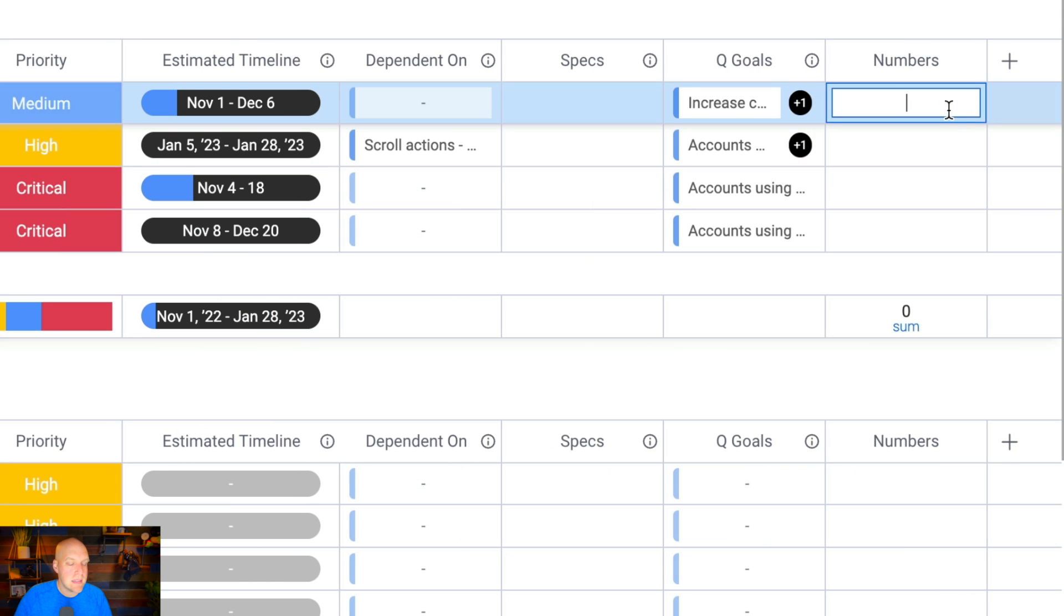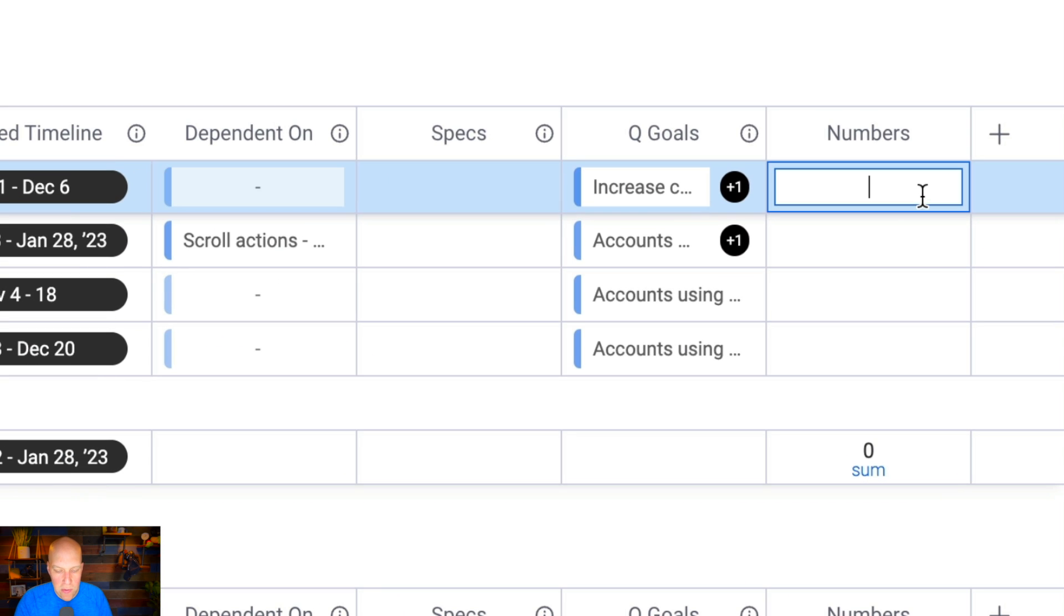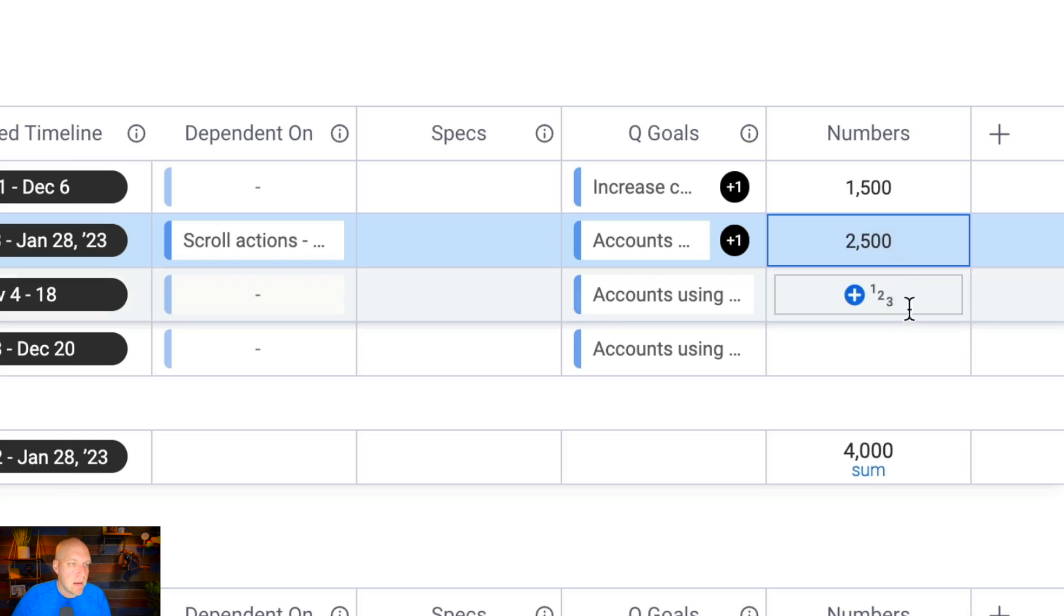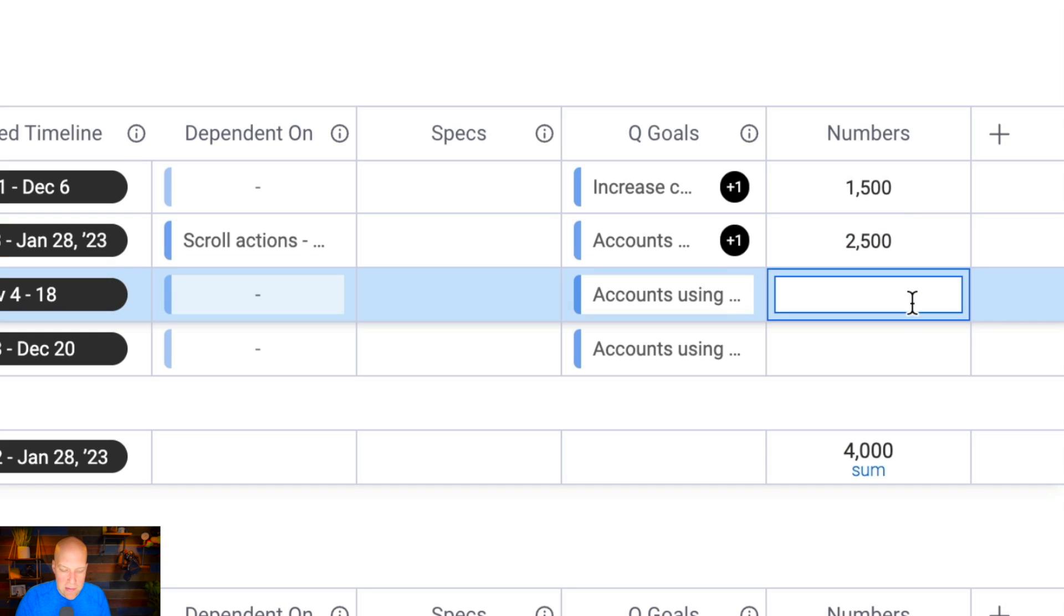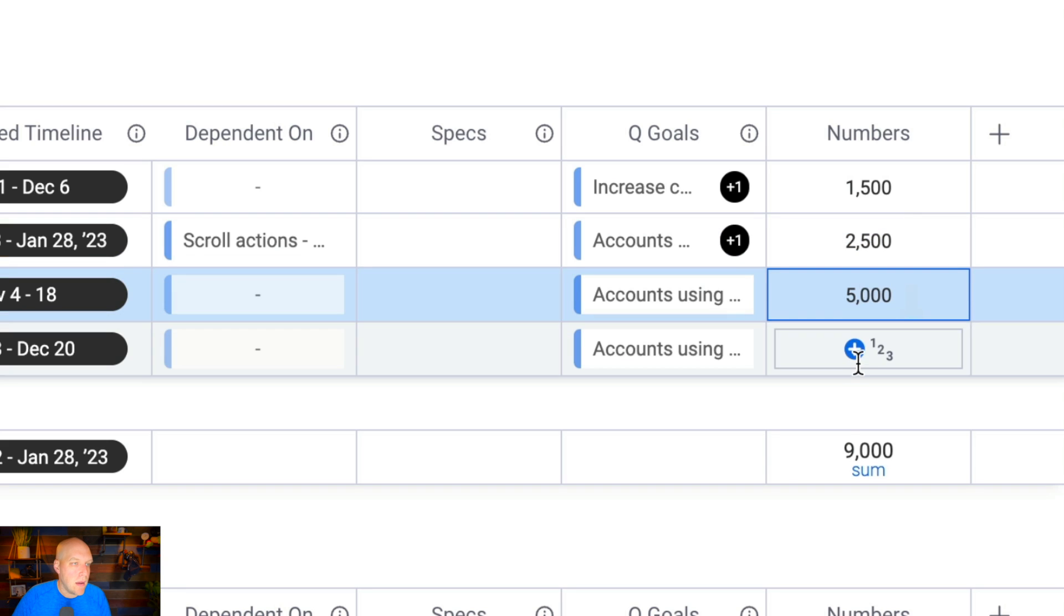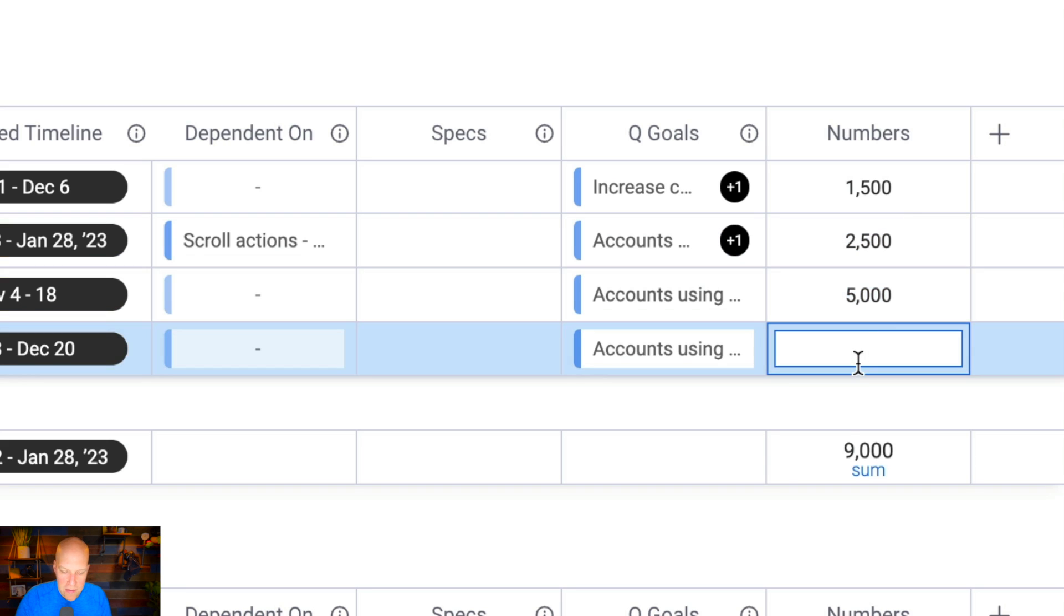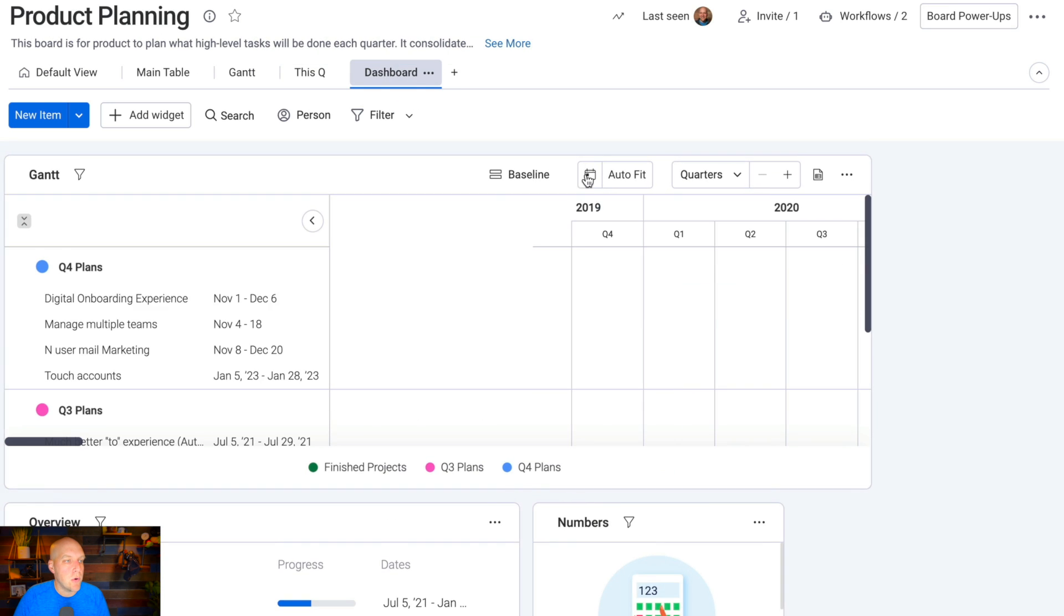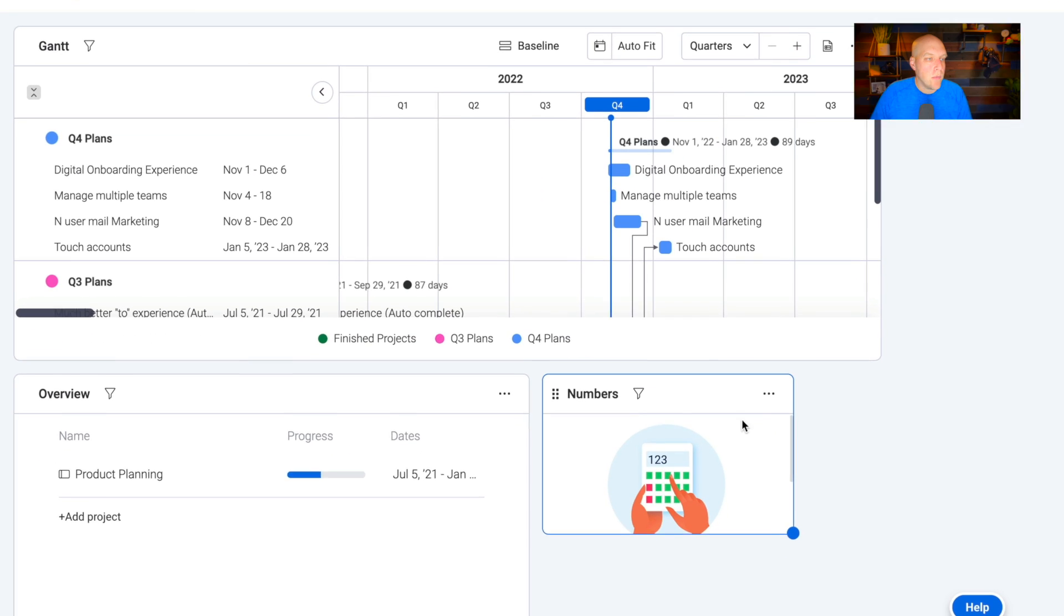Let's say you start assigning what you think the cost of different things are going to be based on man hours. You can also change it like you can actually put in a column for hours, you can put their hourly rate, you can figure out all this stuff using equations. But in this particular case, I'm just putting in some theoretical costs for things. Let's say this one's only 50 bucks. We go back to our dashboard.